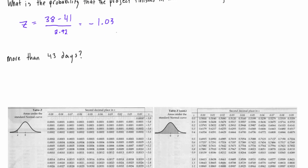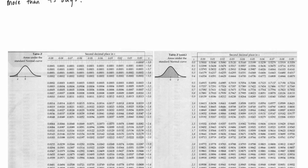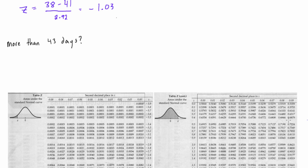Let's take a look at them. We're looking for a z-score of negative 1.03. What we look at down here is there's two possible z-score tables we can use, one where our z-score will be negative, and one where our z-score will be positive. So we have to locate our number, our z-score, and it will return one of these probabilities floating in the middle of the table.